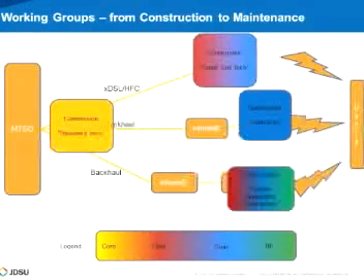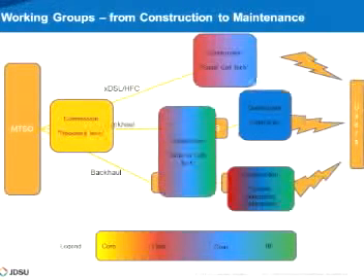deploying. In a construction where you have DAS systems, where you have system integrators and contractors, now they have not only the fiber and the coax, but they're also oftentimes responsible for doing the RF aspects of it, whether it be the pre-walk and the baselining or the afterwards, but ultimately they are responsible to basically cover all three of those areas. And then the actual commissioning, whether it's the network equipment manufacturer or the cell site technician, again, they too oftentimes have to deal with all three, fiber, coax, and RF, in that actual commissioning of the site.